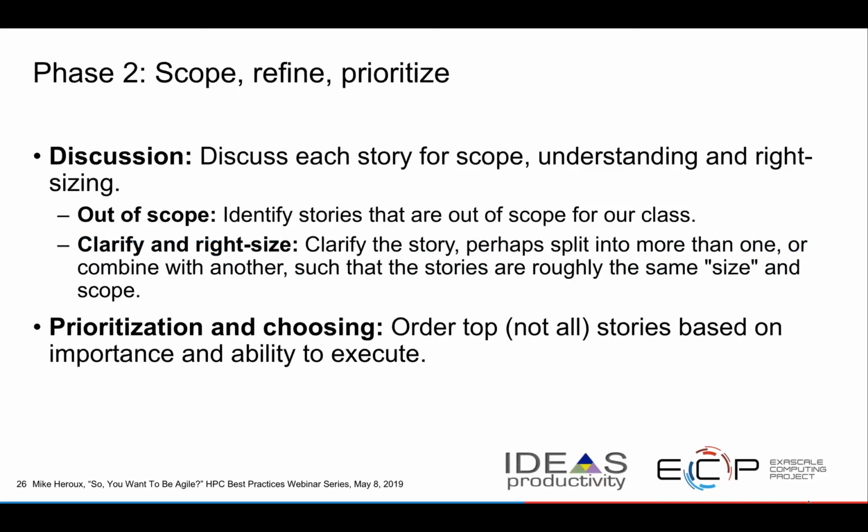And by right-sizing them, you want to put them in a scope of effort that can be accomplished over, say, a few weeks to a few months of time. At least when you're getting started. There are hierarchical planning techniques called epic, story, task, where you can get more involved in longer time, short, and very short times. But just to get started, scoping things like this is useful.